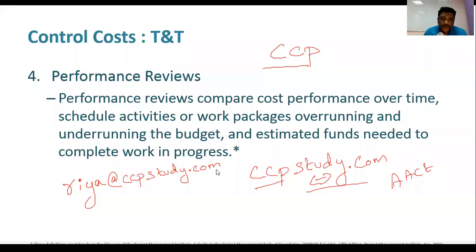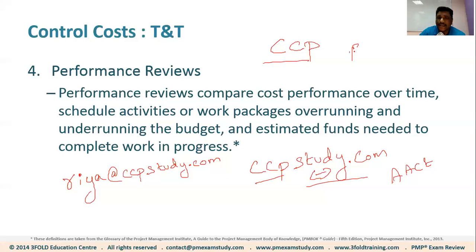Somebody's asking, that's a good question: I understood earned value management for cost, can we also apply this to duration? Yes. Earned value is also applied to duration. When you do that, that is called productivity analysis. For example, the BAC can be budgeted work hours, for example 40,000 work hours.